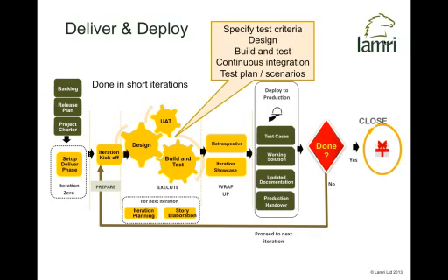Now, it's clearly not the full system. It's a fragment, a snapshot, or a slice through the final system. So that's the idea of an iteration showcase. And also, very importantly, we get the idea of a retrospective, of sitting down as a team and saying, okay, what went well, what didn't go so well, what will we do differently next time?